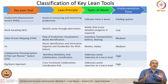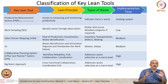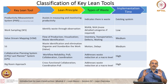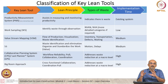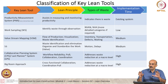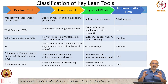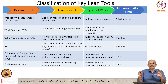When we look at value stream mapping, it looks at flow of production — we can visualize the process, identify waste such as inventory, excess transport, defects, and all of that through value stream mapping with appropriate measurements done in the process. It takes a certain amount of effort and time to implement; it takes training and discussion. So VSM takes a little bit of effort to implement.